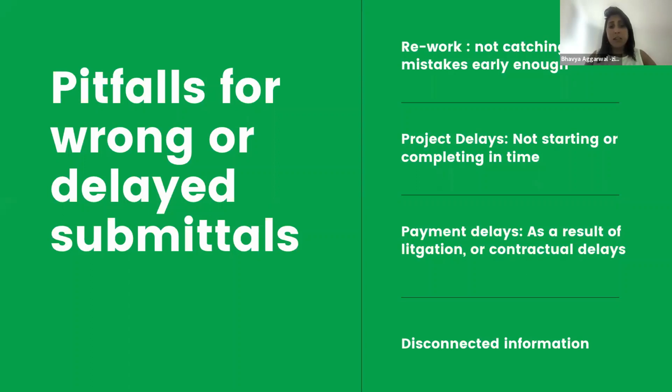Payment delays, because the stamped submittal documents act as contracts as well, and they end up delaying the entire payment chain. And then, especially for large scale projects, disconnected information, not having one central place, or not knowing what is going to be used pre-construction before going into construction, can really lead to disconnected information.